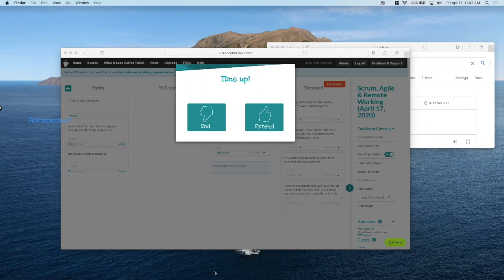Right. So one of the things that we added to our definition of done as a whole is that any item that the team takes in and works on, for it to be done, it has to pass through staging and pass that and the QA sign off. We sign off on it, but we have to promote it. It has to be ready to be shipped, as in if we can ship it today, then we ship it today. So we added that versus just passing QA. We add that it gets deployed to production.